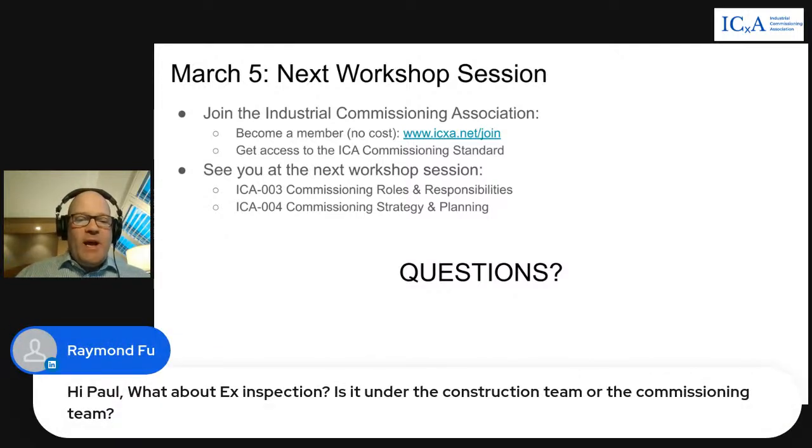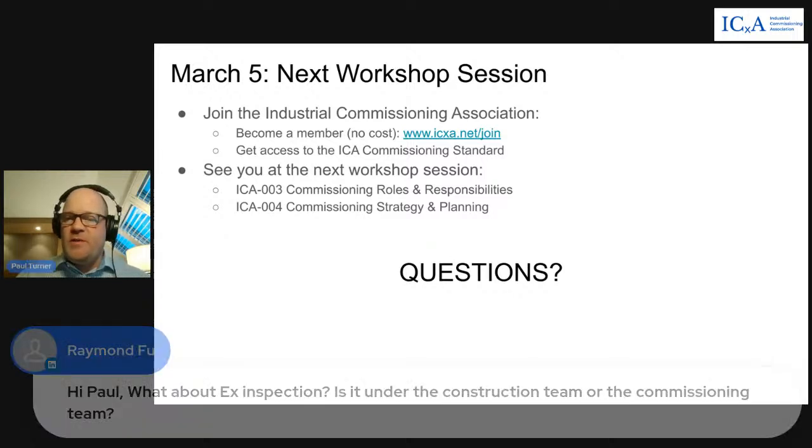What about X inspection? Is it under the construction team or the commissioning team? X inspection sounds like a construction function. I'm not sure exactly what you're referring to with X, but anything being shipped from the factory, arrival at site, confirming site receipt of any of the equipment being shipped to site, that's all a construction function, as they're managing the procurement of equipment as it's being installed.